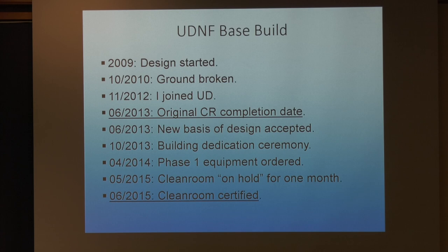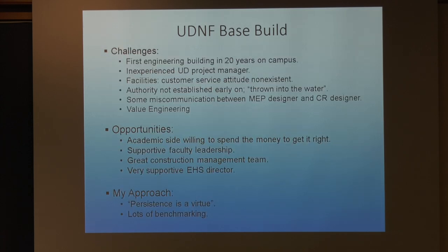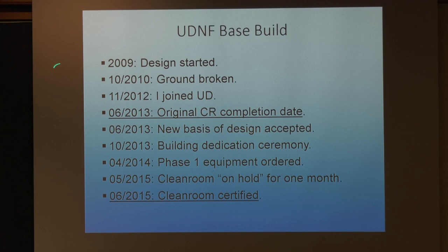So this is just a timeline. Now I'm focusing on my cleanroom at University of Delaware that I currently run. Design started in 2009. One year later, the ground was broken. I joined in November 2012. The original plan was for the cleanroom to be completed in June of 2013.